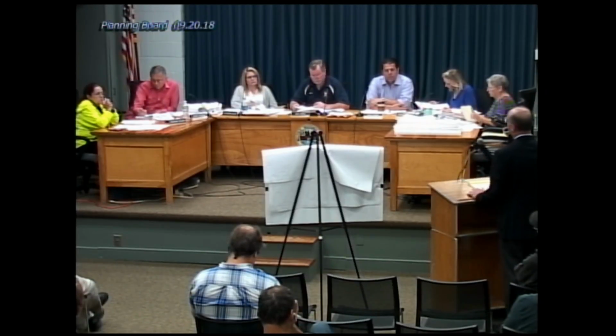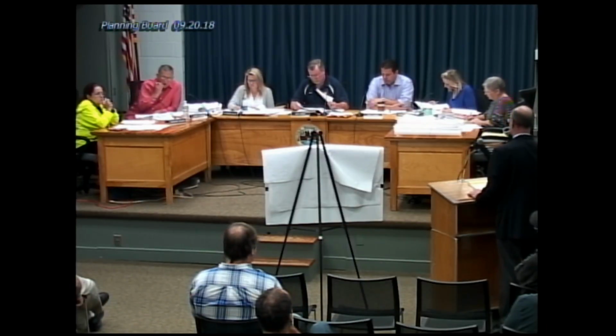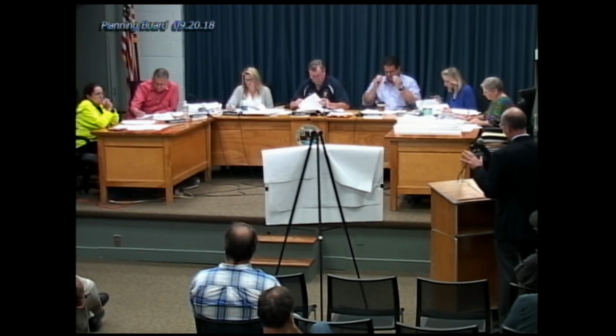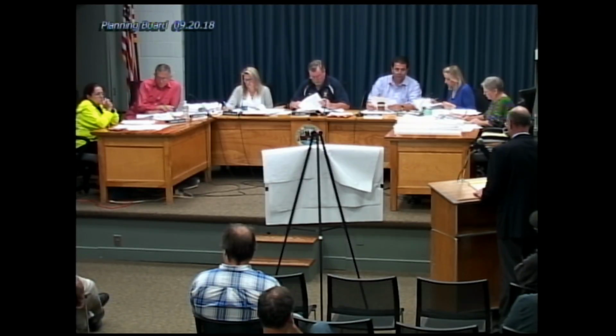So they won't give us a curb cut until the Planning Board and the Conservation Commission have approved this, but we feel we're on solid ground with the curb cuts as shown on this plan. They've kind of been, to some extent, pre-approved by Mass Highway.